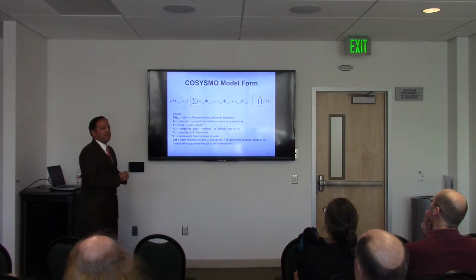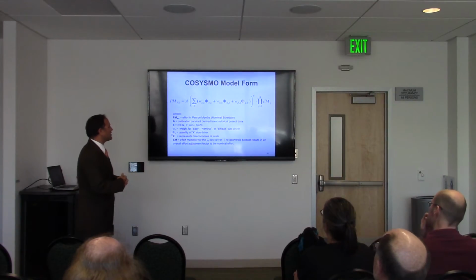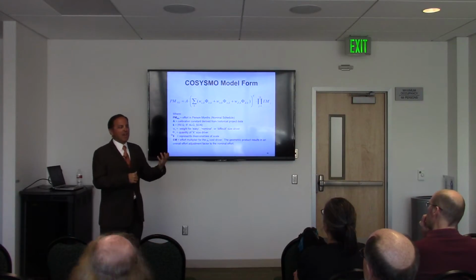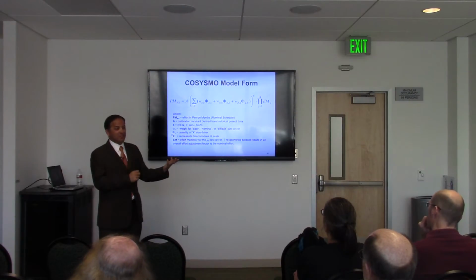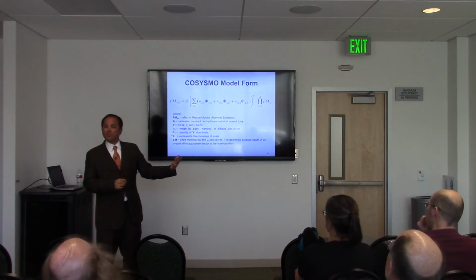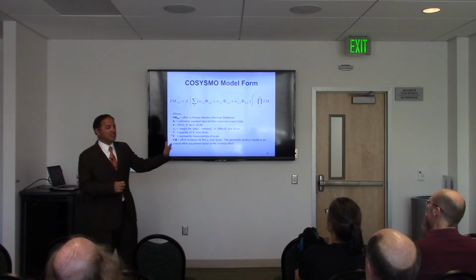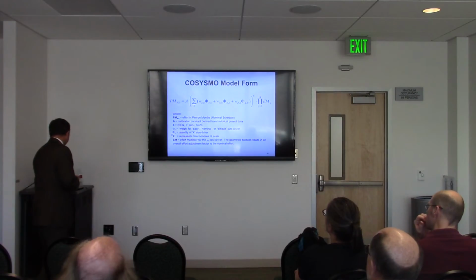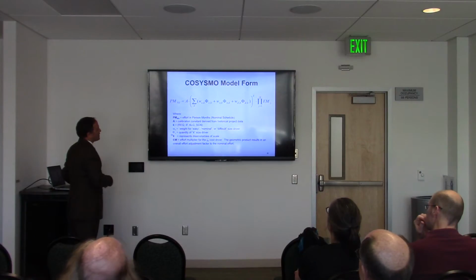At the end, you have a product of 14 effort multipliers. So capital Pi, again, is just a product. And what those 14 effort multipliers help you characterize is how difficult is this project relative to other things. So this is a relative measure of complexity. Have you done something like this before? Are your people trained in the right tools, right? Are they located in the same time zone or not? The answers to all these questions drive the cost up or down, depending on how you answer them. So let me give you a little bit more detail on some of those 14 effort multipliers.